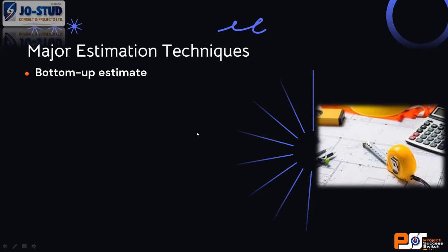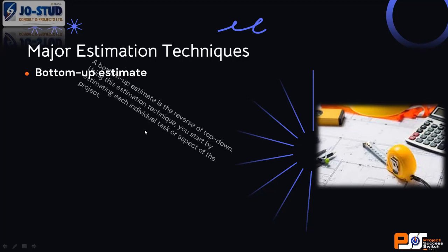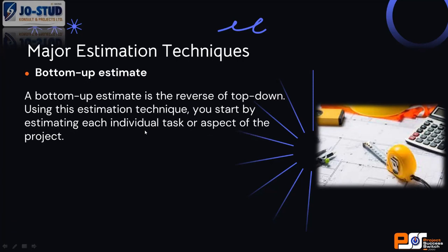It has other names, but we call it BEME. BEME is more conventional in the built industry. The engineer will give you BEME. And what does BEME do? BEME breaks the work into each task, the materials, the quantities, and all that. So it makes your estimation more accurate. Sure, some QS will require that you send a BEME with your designs for them to do the estimate. So the bottom-up estimate is the reverse of top-down.